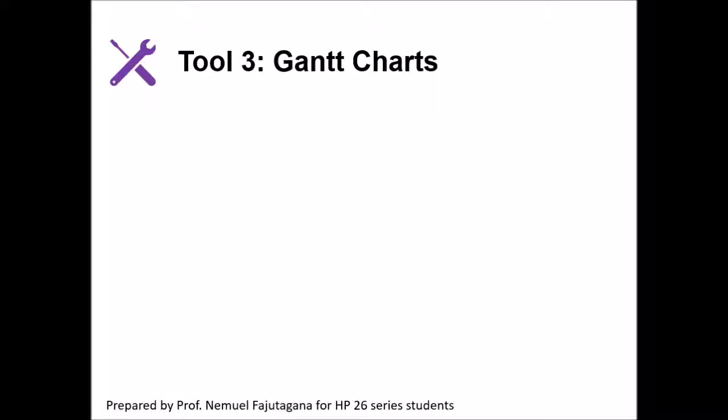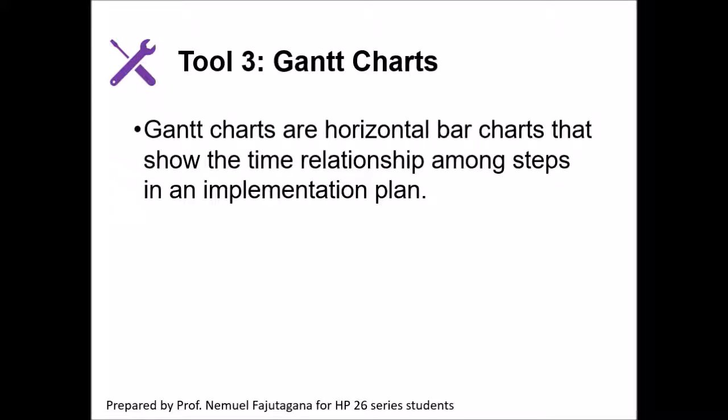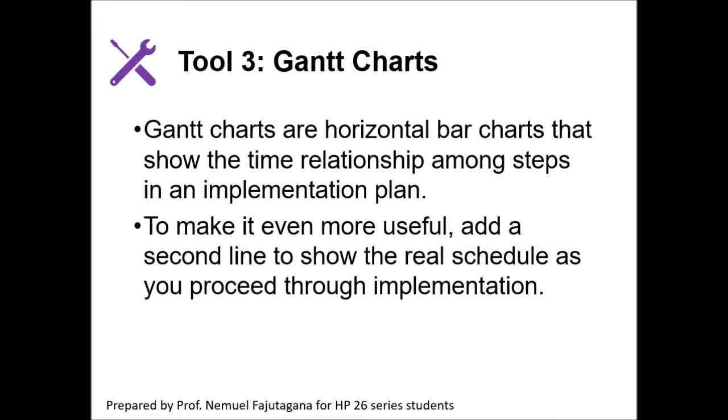This one you're very familiar with, I know, Gantt chart, right? Of course, Gantt is a name of a person who invented the chart. Horizontal bar charts that show the time relationship among steps in an implementation plan. So many people use this. Parang lahat na lang may alam sa Gantt chart. But to make it even more useful, add a second line to show the real schedule as you proceed through implementation. And of course, you can also add the people who will be performing the procedure.